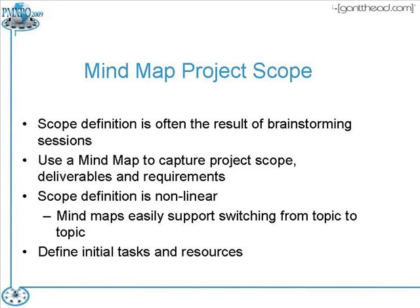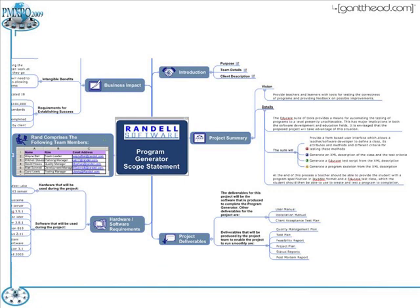Here's one example of a template used to generate scope for a given program. In this model you see there's a basic project summary available, as well as project deliverables — hardware, software requirements, and business impact. By building an agenda around scope, you're able to identify the details and capture the discussion about what they want to see in the scope of the project or program.